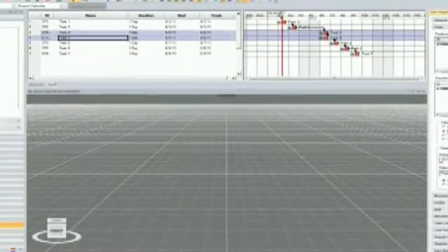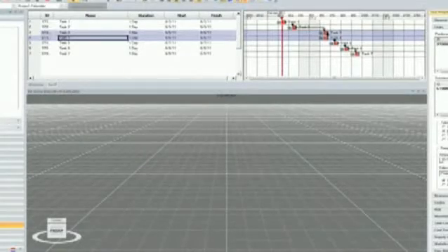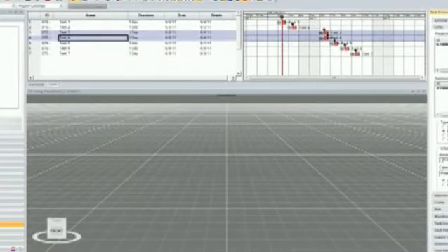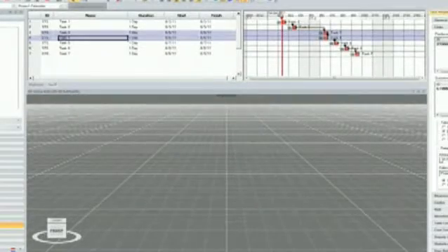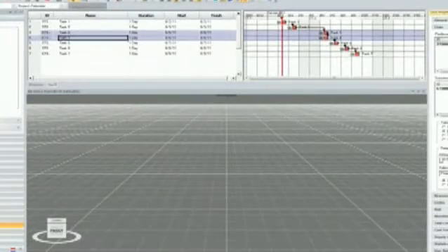So with Primavera, P3, P6, we have 4 ways we operate, which is a bidirectional communication with Primavera. So we're a technology partner of Primavera. We can import, export, synchronize to, and synchronize from Primavera. So for an example, you've got a schedule in P6 or P3. You bring it to Synchro. You have your model, and you start linking your model to your schedule.